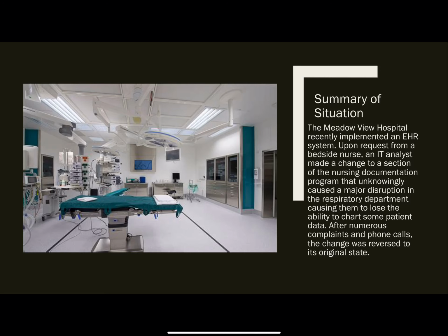Meadowview Hospital recently implemented an EHR system. Upon request from a bedside nurse, an IT analyst made a change to a section of the nursing documentation program that unknowingly caused a major disruption in the respiratory department, causing them to lose the ability to chart some patient data. After numerous complaints and phone calls, the change was reversed to its original state.